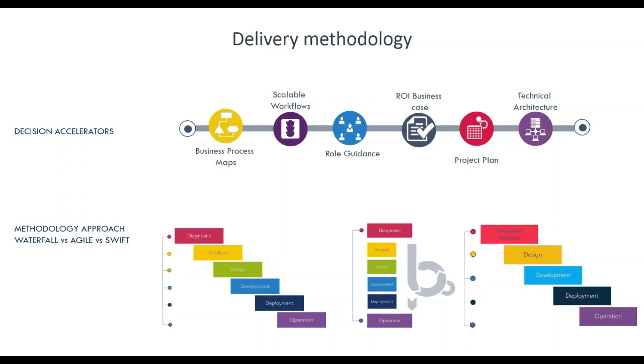However, gaps are a daily fact of software implementations, and our teams will do their very best to encourage standard functionality and will demonstrate processes that could be followed instead of modifying Dynamics. We don't want to change the Dynamics solutions unless we really have to. So once the templated analysis is initially completed, we progress through the standard delivery aspects of a project in a waterfall type style, which takes you through the training, user acceptance, cutover through go live, etc.